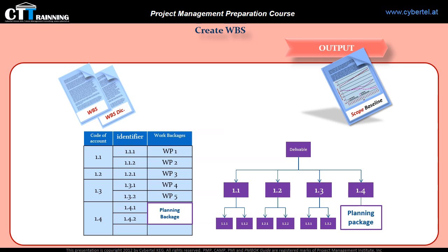What are planning packages? Well, the PMBOK guide defines them as follows: a work breakdown structure component below the control account with known work content but without detailed schedule activities. That means a planning package includes known future work until the work could be detailed and broken into work packages as we know it. So that was all about the WBS, the work breakdown structure.